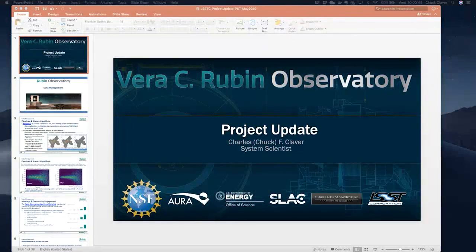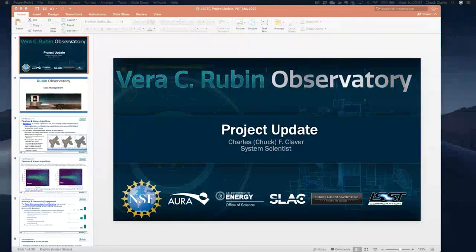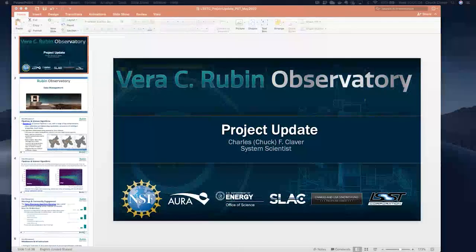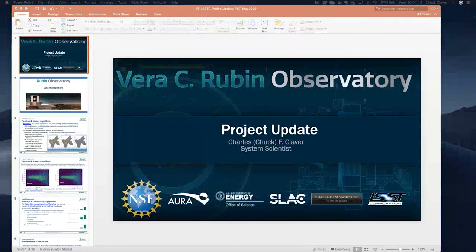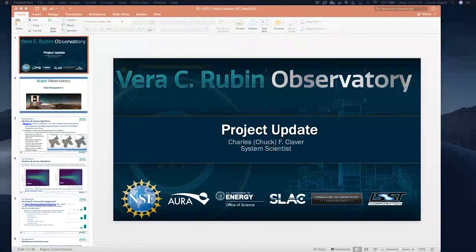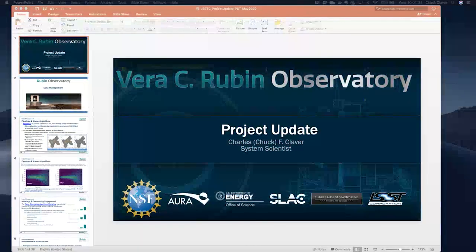Internally, the next big milestone is bringing together the M2, M1M3, and hexapod rotator — which have each been tested individually at Level 3 — and conducting an integrated test of all those operating simultaneously as a single system. Another big milestone is getting ComCam up from La Serena to the summit facility, along with starting the refrigeration pathfinder, which is a major item we want to get going as soon as possible.